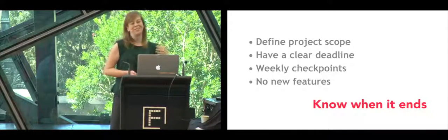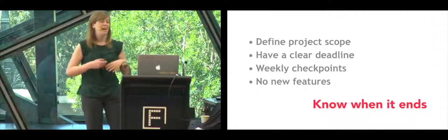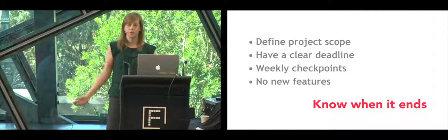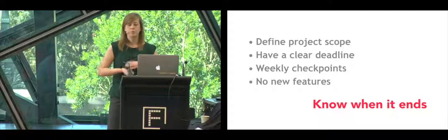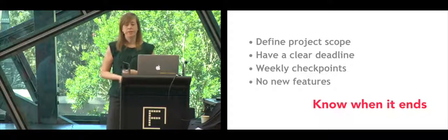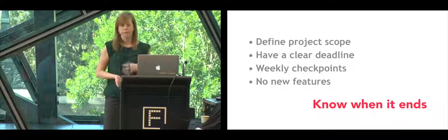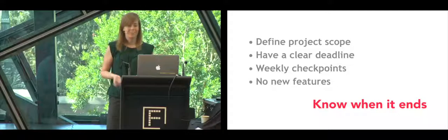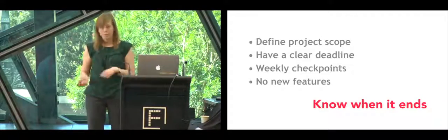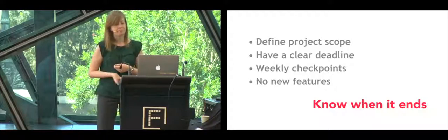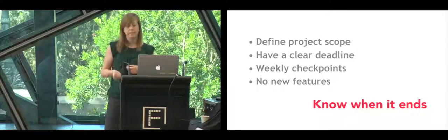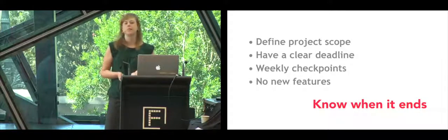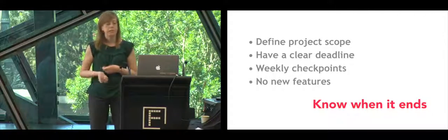This lesson was very hard for us to learn, which was to explicitly define the full project scope and have a clear deadline. What we ended up doing was writing down every single feature that we wanted to keep on the website. We estimated roughly how long it would take. And then we figured out that it would take way longer than we could afford. So we ended up going back and removing more features until we had a manageable deadline.